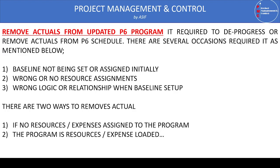The second case is where the program is fully resource and expense loaded. In this case, you have two choices: either remove the resource assignments and expenses, remove the actuals, and then re-import the resources back into the program; or use the Global Change tool to remove the actuals data from the updated program. That technique will be covered in our next video.